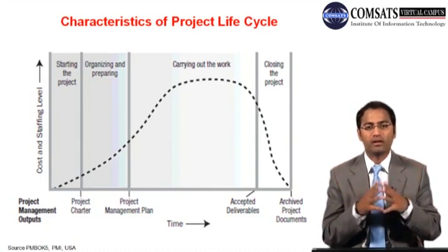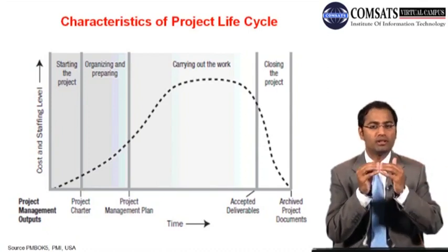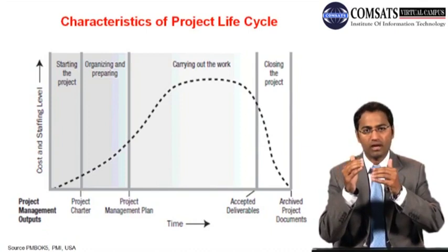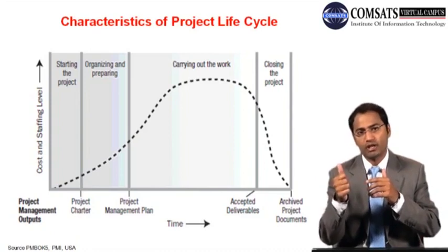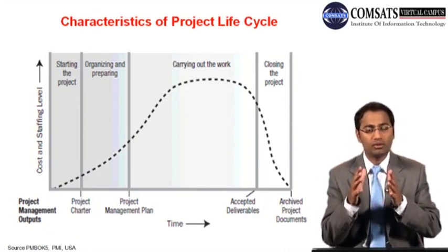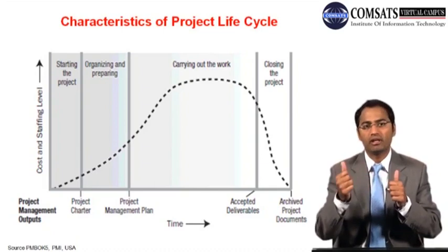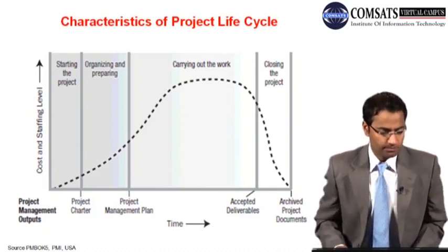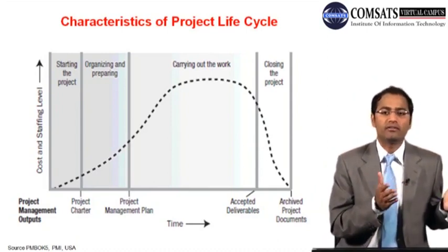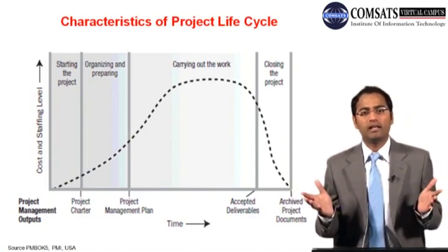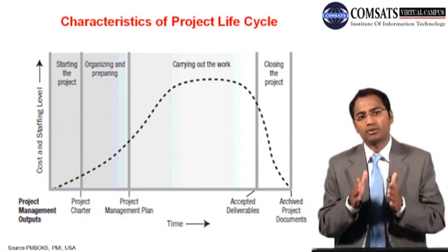Yes, cost is rising with the same level. So there is lesser staffing, right? So you should not bundle cost and staffing together. They are different, because staffing is about human resource management, whereas cost is also attached with other parts like materials and equipment and machinery. So at the start of any project, you are not in need of that machine on your site, or you're not in need of a vehicle fleet you are moving in, right? So you are in need of that stuff while you are actually working.